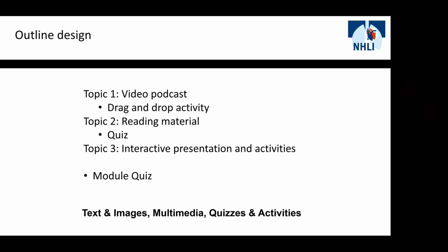I think one of the challenges when you're working on a project like this is that you're bringing together people with different expertise. And what tends to happen is we tend to break off and work in silos. So each of us will focus on our specific area, and then we won't really tend to come together and collaborate. Now, first and foremost, it's a poor way of working because we're not sharing our knowledge and our expertise with one another. Secondly, it also adds to the life cycle of the project. So if you imagine a conveyor belt and everyone's taking their turn as the items move along the conveyor belt, that's going to cause delay.